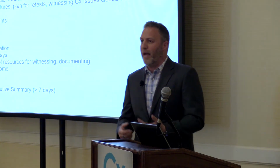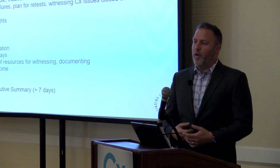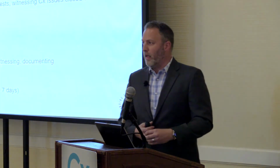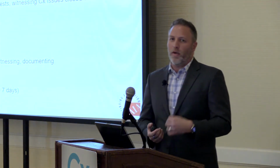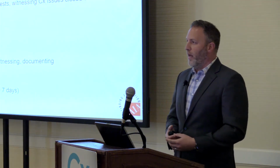I haven't run into many CRAC units that haven't worked. But what I've run into is a lot of the building management system and just the hundreds of thousands of points you're pulling for a data hall aren't working correctly or aren't linked correctly. So understanding you have to spend time to go back and do that. So it's going to require long days and long nights by your team. Have a safety plan in place. Don't work your teams to 14-hour days. Keep it to 8-hour shifts. But maybe you have night shifts and day shifts.